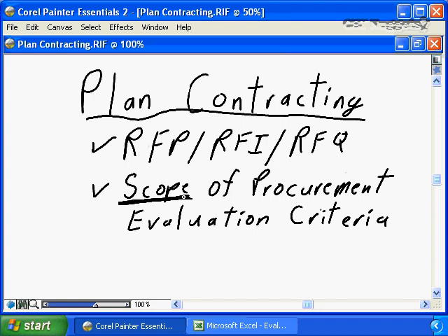It could be argued by some that the scope definition for the procurement processes needs to be more intense, more well-defined than the actual project scope itself, and that's simply because you're entering into binding legal contracts as part of the procurement process. Therefore it's important that the scope definition is so well-defined, so ironclad, that there's no room for ambiguity, there's no room for interpretation in the contracting process, that it absolutely binds the seller to deliver exactly what you need for successful project delivery.